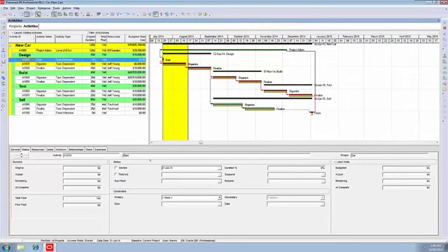which is a milestone. You can see from the Gantt chart there, it's a diamond, so a milestone. We need to be told, did it start? Did the project start on the 21st? Yes, it did, so tick. Notice the computer ticks finished automatically. It's a milestone, there is no duration, so as soon as it starts, it finishes, and the computer knows that. And that's all you do with a milestone. There are no resource hours on a milestone, and usually you don't put expenses on a milestone. So that's all you generally do with a milestone.